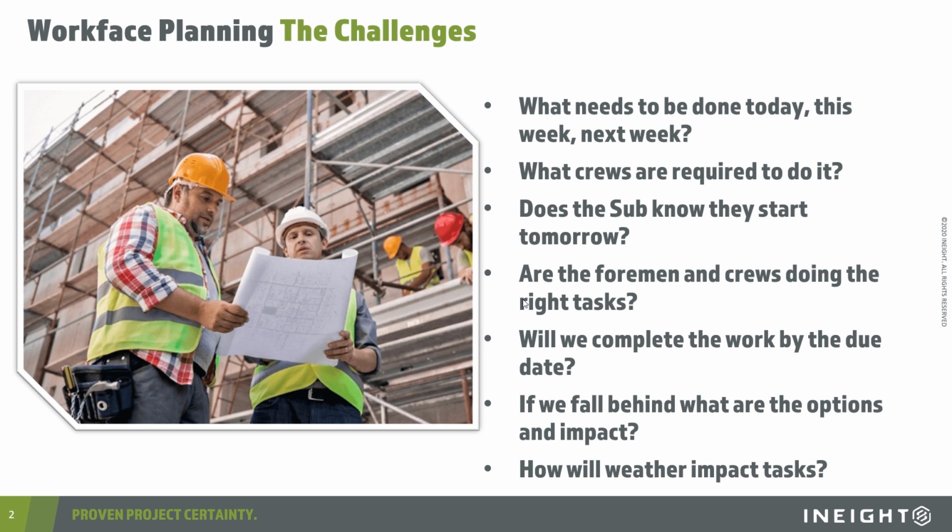Interval planning is a process that addresses the dynamic nature of executing work in the field and continuously evaluating dependencies and other constraints to keep work flowing smoothly. It really requires this detailed planning to ensure that the crews have what they need when they need it and sets forth safety, quality, productivity, cost, and completion expectations before the work begins. Now look, today I'm going to use the term interval planning. This practice goes by many names: SIPP, SIS, look-ahead scheduling, field execution planning, work-phase planning, last planner. They all kind of mean the same thing.